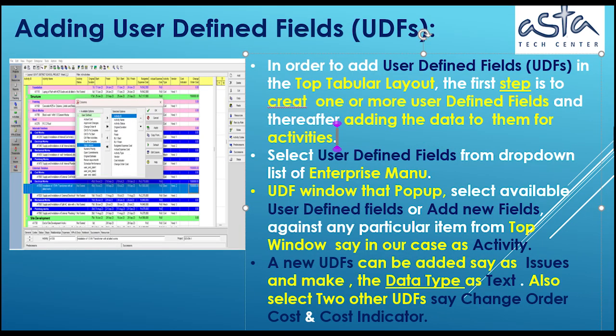Adding user-defined fields, UDFs. In order to add user-defined fields in the top tabular layout, the first step is to create one or more user-defined fields, and thereafter add the data to them for activities. Select User-Defined Fields from the drop-down list of the Enterprise menu.